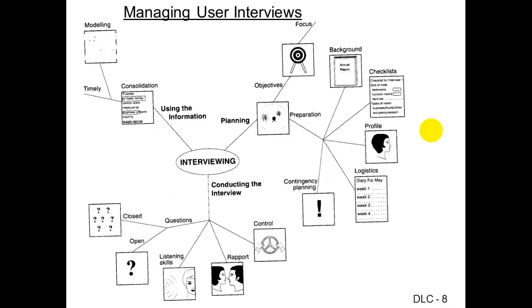Okay, the diagram is pretty detailed. I don't want to bother you with all those details, but you start from here. You plan your interview in terms of what you try to get out of it. Try to understand the background information about the unit or the user you want to interview. Prepare a list of the things you need to get ready, and also a list of potential questions you may want to ask. Understand the background of the people you're going to deal with, and schedule.